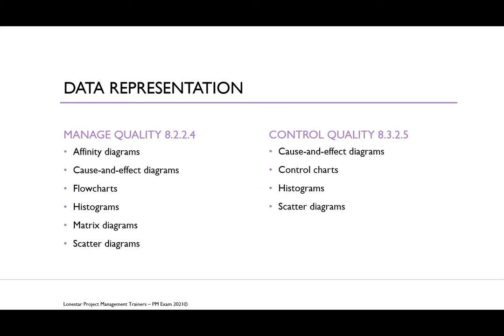Your flow chart shows a series of steps that lead to a defect, and your histograms. Now, your histograms show a graphical representation of the numerical data. Your histogram can show the number of defects per deliverable, a ranking of the cause of the defects, the number of times each process is non-compliant, or representations of the project or product defects.